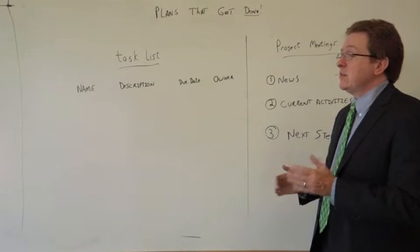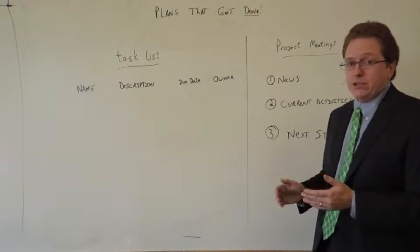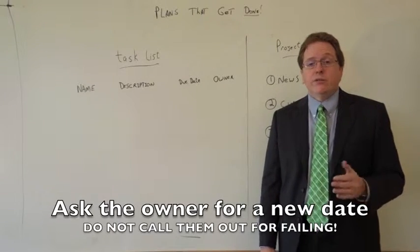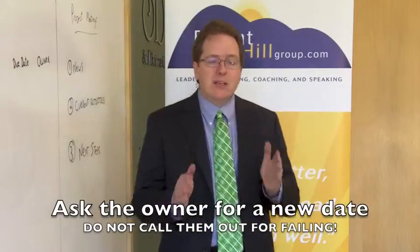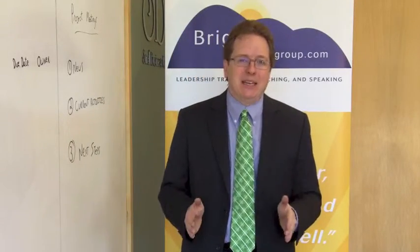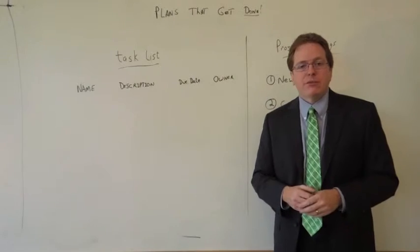Now what's going to happen? Some of the items aren't going to happen as they were originally scheduled. Just ask the task owner for a new date. Don't call them out publicly for failing to keep their commitment. The place to do that is outside the meeting. So all you do is just say, when is number seven going to get done?